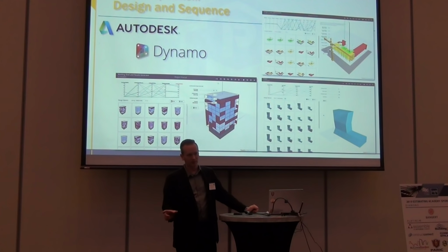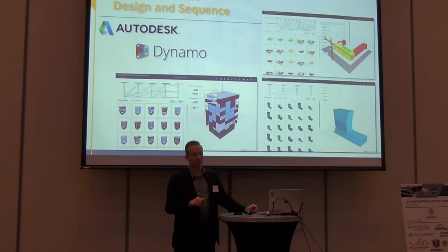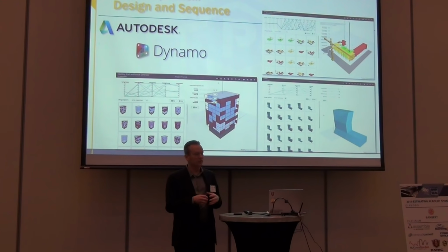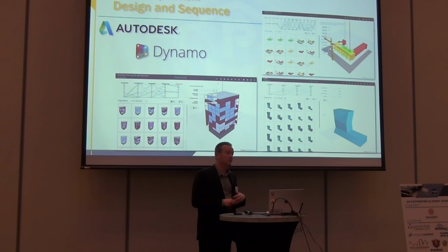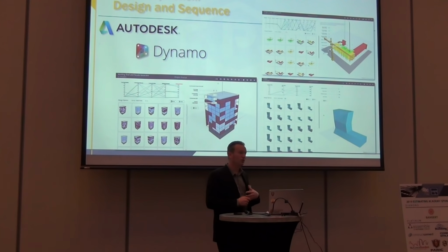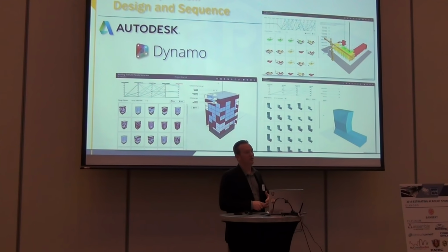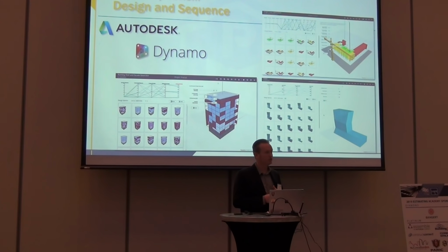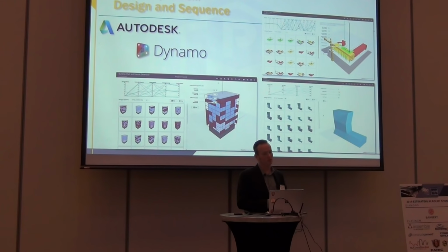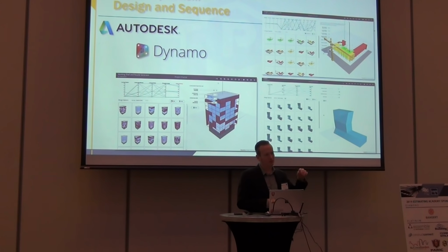But this is the program that's going to work for my budget, to my knowledge. Now we've got a starting point, and the design team can take off from there. Not just the architects, the MEPs. For us, we want to know, is it going to function well? How big of a rooftop unit are we going to need? What's the floor-to-floor height really going to be? If I can reduce my floor-to-floor height, I can take away some skin. So all these different variables allow me to study that in a different way.